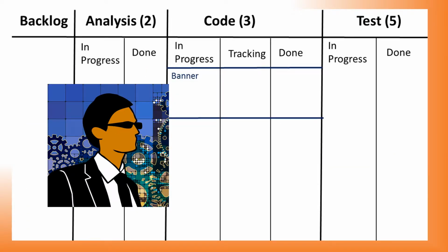Enrico uses some project management tools to check the work in progress limits. He finds that there tends to be a backlog in the done column for analysis, so we need to pick up the pace in coding. We'll raise the work in progress limit by 1.